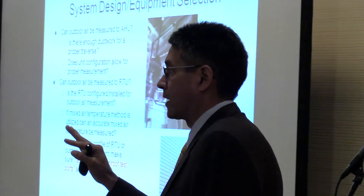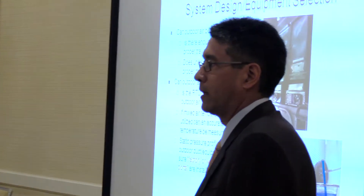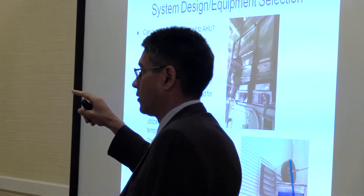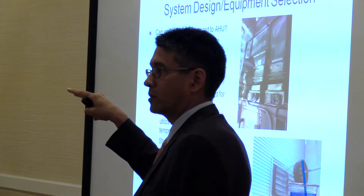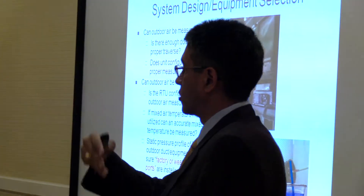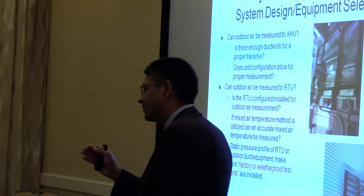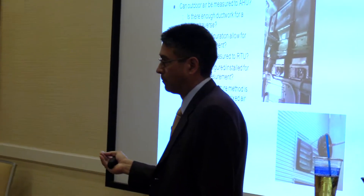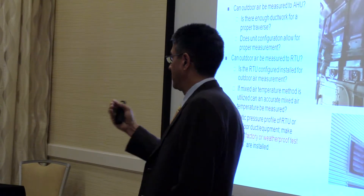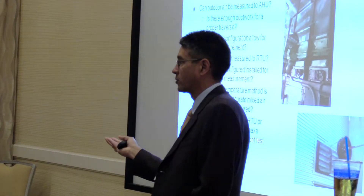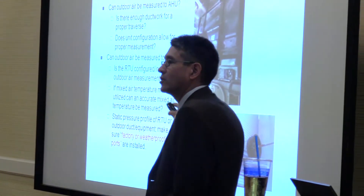Talk to the equipment suppliers early. A lot of times now you have the package rooftop with the package heat exchanger, close-coupled in the roof curb. There's no way to get an air flow measurement on that heat exchanger — whether a cross plate or a wheel. In our area we're starting to see factory test ports to measure pressure drop across the heat exchanger and correlate that back to their charts for airflow. Open that conversation early so we can get some good data.